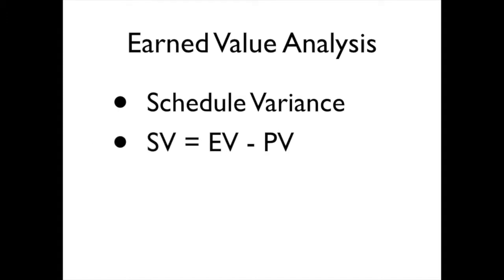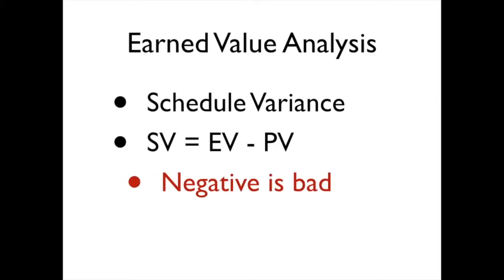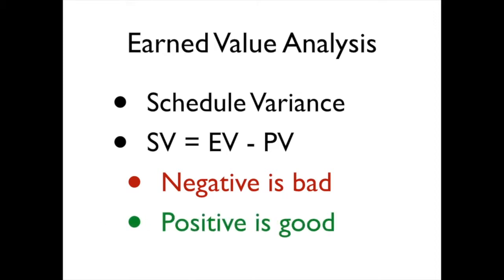Schedule variance is calculated as the earned value minus the planned value. Once again, negative values are considered bad. So if we have a negative schedule variance, we're going to say that we're behind schedule. Positive is good, meaning that we're ahead of schedule or we're getting more done than we had anticipated.